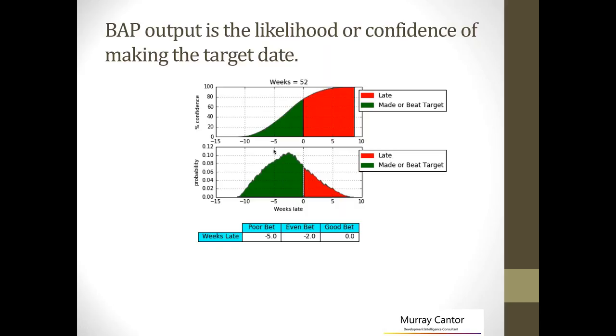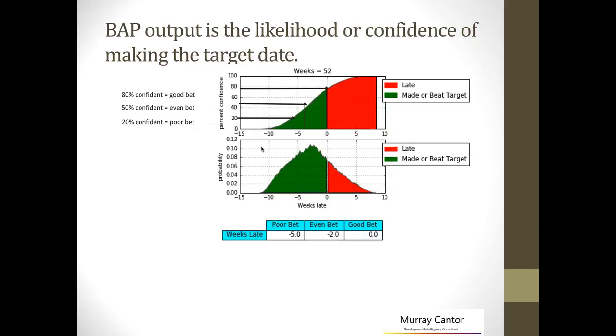And what you do with these things is you do this with the amount of remaining work, the amount of weeks left, and what you've learned about your velocity, and you track these as you go forward week by week, to see what your probabilities are as you approach the target date. So you don't get into this green, green, green, red phenomenon where you discover late in the project that you had no chance of making it.